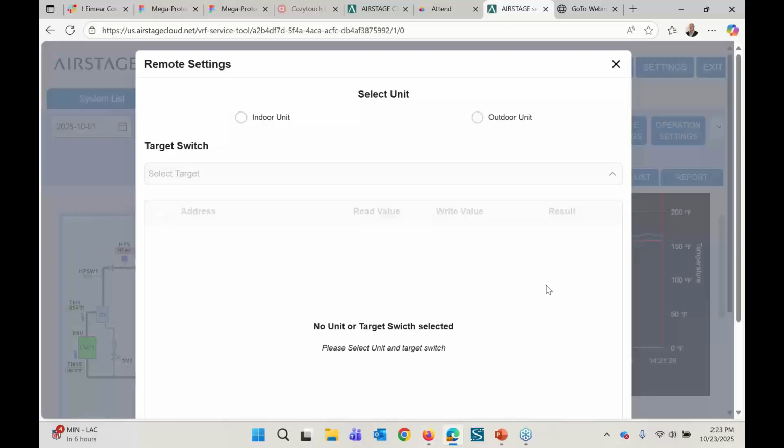So what I strongly suggest to customers is that your people in the field who are doing the VRF install, all they do is they do the installation. And then you have a person back at the office that can come in to do the configuration of the system, do the startup of the system, do the troubleshooting of the system. That allows your people that are at the job site to be able to get through the job site faster.